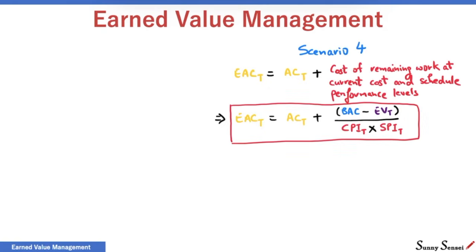I must mention that this is not a mathematically precise formula. The SPI has nothing to do with the cost. It is the work done relative to the planned scope, not related to cost. In real world, delay in schedule can potentially increase the cost. The usage of SPI in this formula is an effort to somehow roughly capture this impact.